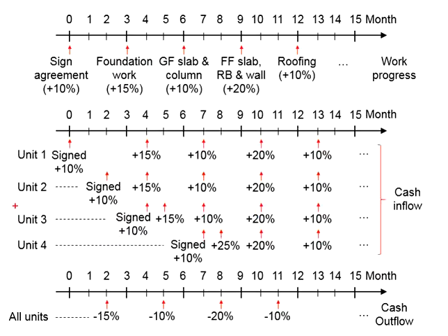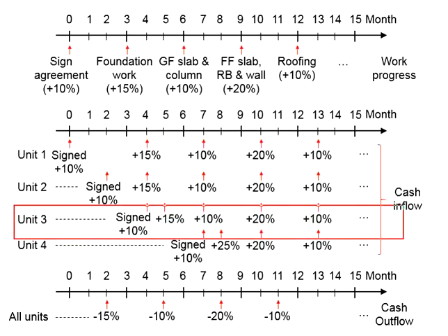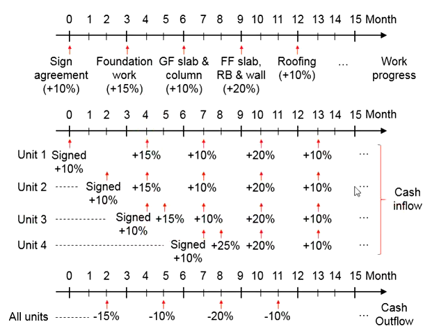Let's say now you sold another unit in month 4. Then you get 10% of the payment. Taking considerations of the administration's process, you will receive that 15% for the progress payment 1 month later.